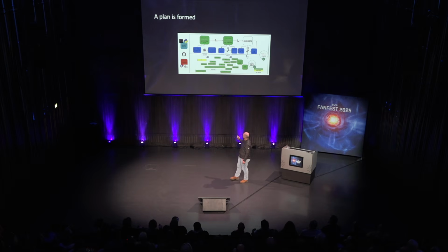The lower track is our C++ code base. There's a tiny two-way split here. The first one was, can we get the Stackless Python builds for Python 3 going in our environment? There's a lot of minor detail that we need to pay attention to as well. And then we have all of the different engine components that we needed to port over that we took as small milestones to go through. And then some bigger milestones towards the end, like getting the server and proxy running, getting the client running, and so on.